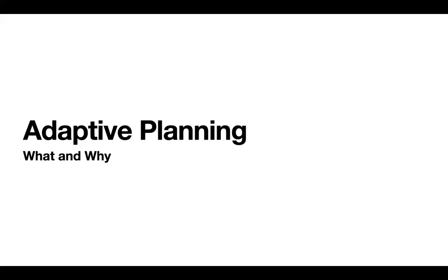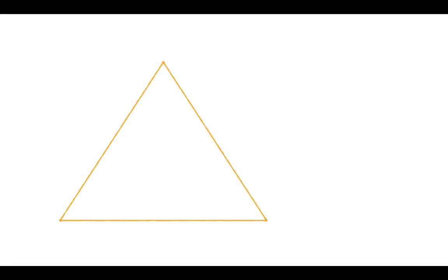Now, if you've done any project management, project planning at all, you would have heard the term called the golden triangle. And the golden triangle is nothing but a way to balance three primary levers that you have for any kind of project management. It's not even necessarily software projects, but it's applicable completely in software projects as well. And the three levers that you have are the lever of scope. So you could vary how much you deliver in a particular project. You could vary the cost, how many people are working on this project, right? So the cost that you incur, and you could vary the time. So you could vary how long it will take to deliver something.